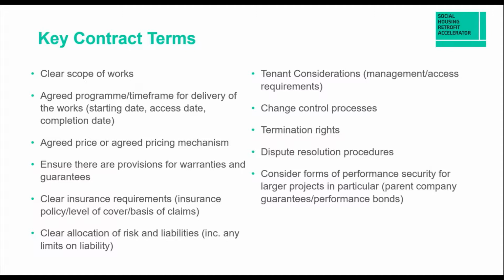first and foremost then, a clear scope of works. What is the contractor expected to deliver? What is he doing? And the more detail, the better. So for example, if the contractor is installing some solar panels on the roof, is there a specific specification that he has to deliver to? Does he have to provide operating manuals as part of the installation? Does he have to provide training or an explanation to the client or the tenants as part of this? So being as clear as possible is very important.